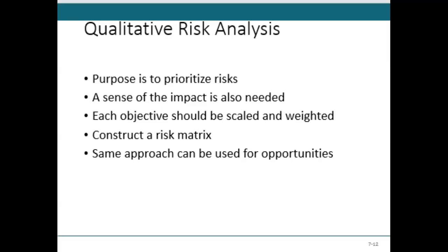Welcome back. Once we've planned risk management and collected all of the risks and put them in a document called a risk register, we want to understand your risk tolerance, the normal day-to-day degree of risk and uncertainty you're willing to take. It's somewhere above that. Then there's the risk threshold: how much can you really withstand? Bam, that's the wall. You cannot take any longer. Remember, all risks aren't equal. Some are bearing down right now. They all can change over time, go over the threshold, and become unacceptable.